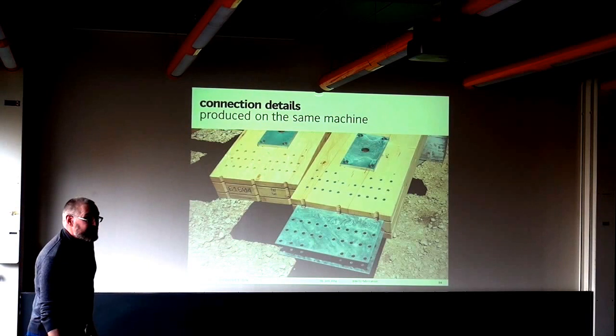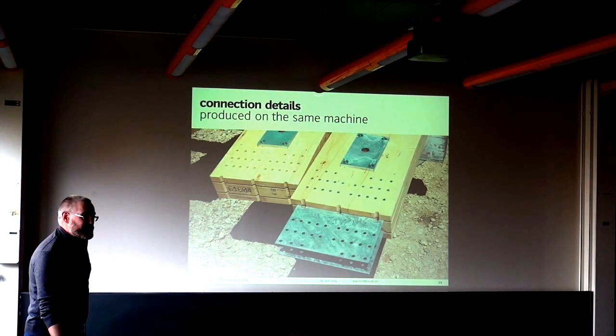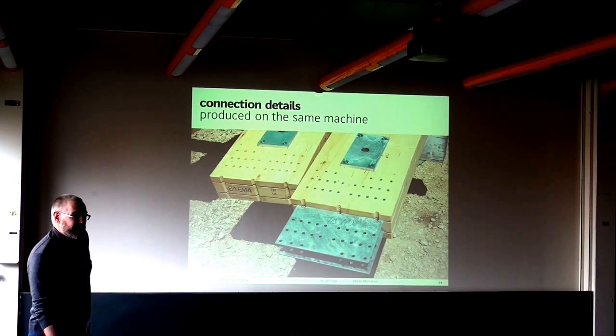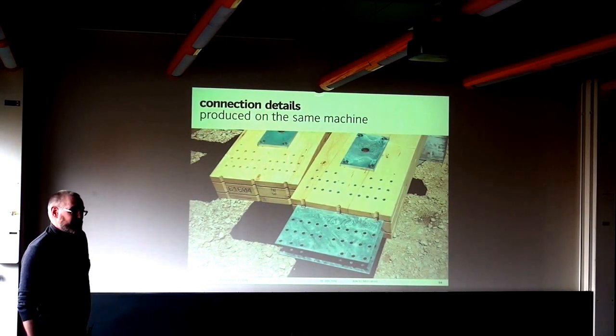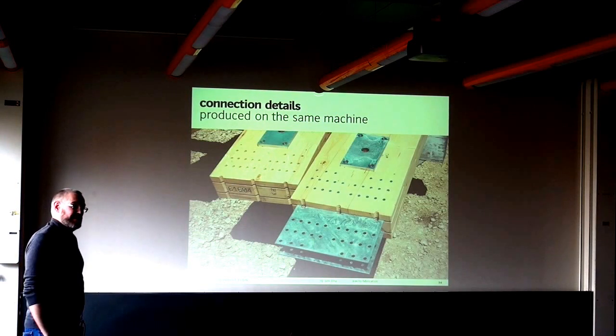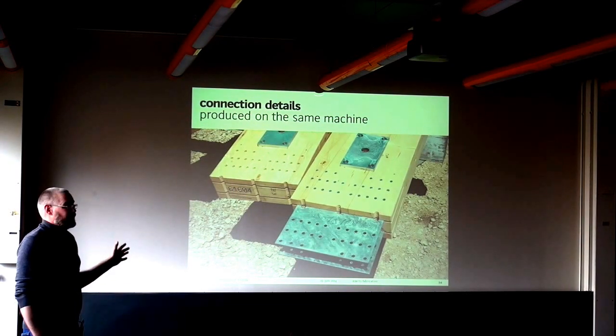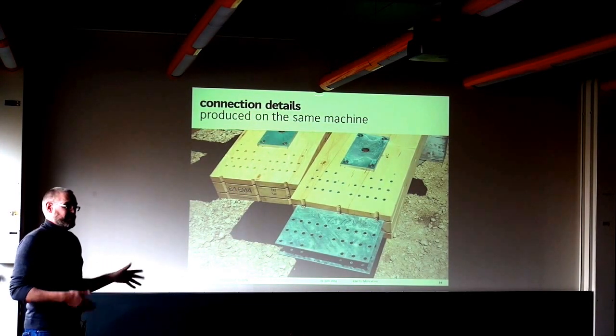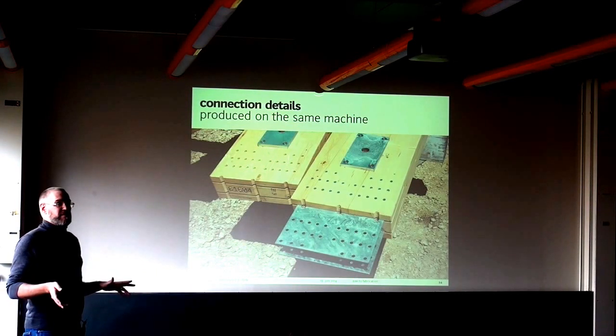How do you manage all these numbers and all these places? You get thousands of different numbers. That's one of the first things that we have to do early on in the project together with everyone: come up with a reasonable numbering system that is not only machine readable, but mostly also human readable. Someone has to understand how things are working. You put it on the trucks in a certain order. That's another thing. There is an unambiguous naming and numbering system for all the components in there.